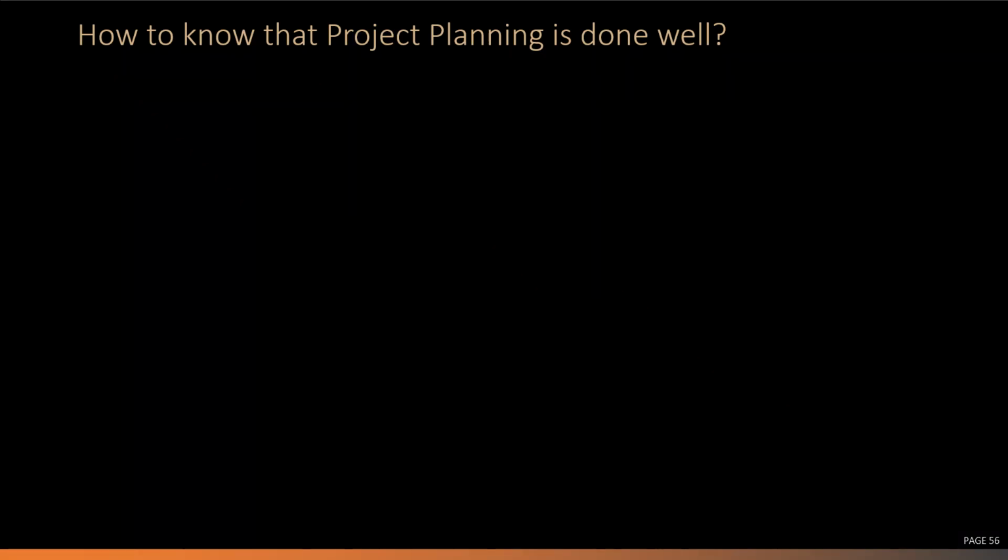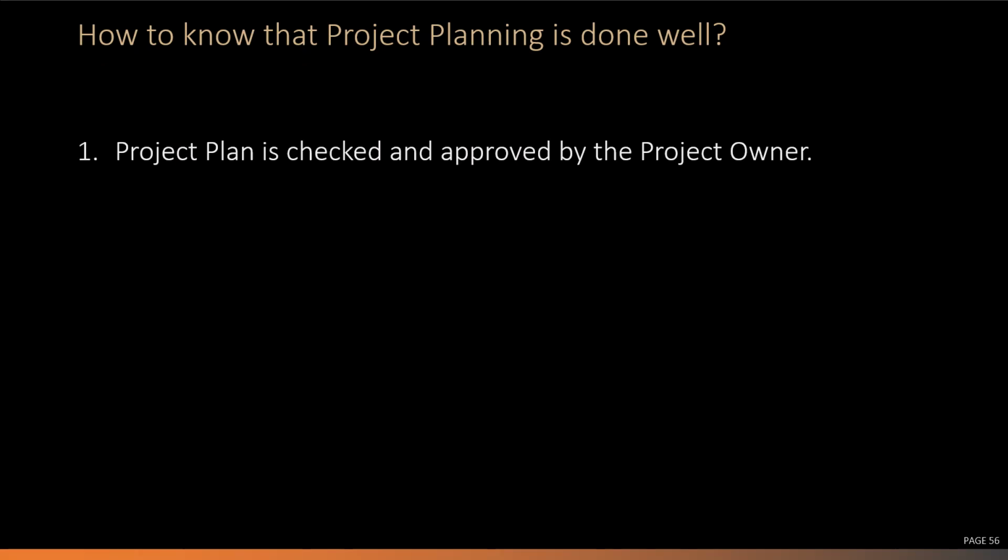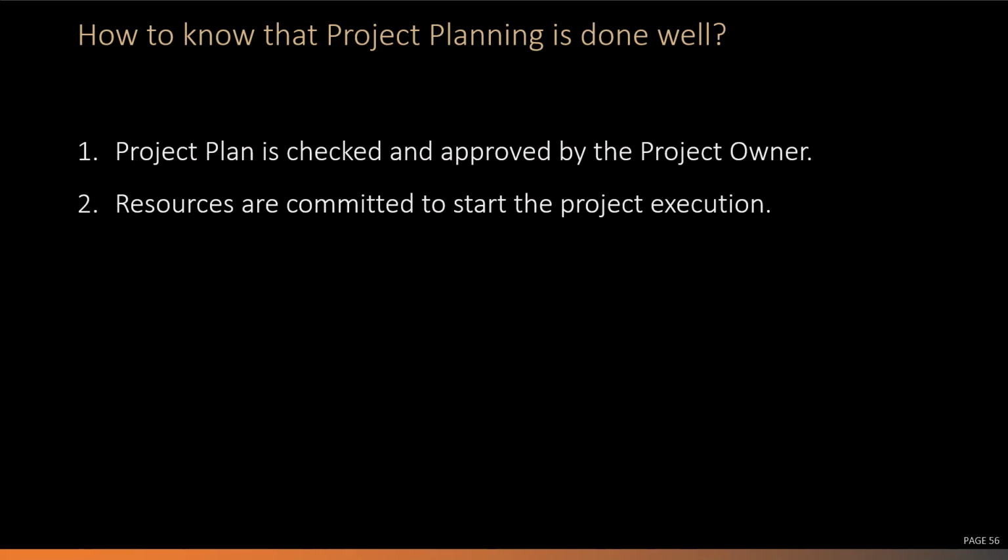How do you know when project planning is done well and you can proceed with project execution? First, your project plan has to be checked and approved by the project owner. And second, resources required to start execution of the project have to be provided.